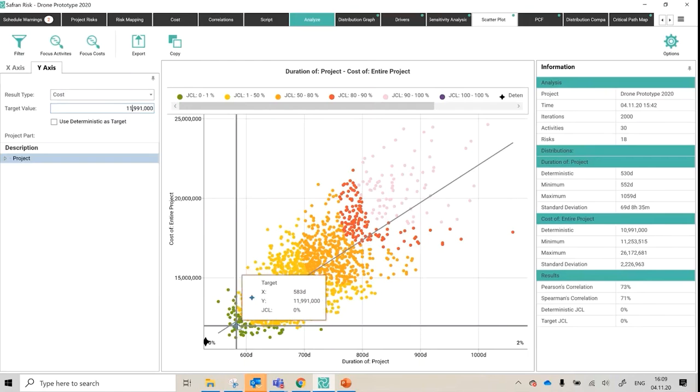It's like hardly any chance that will succeed whatsoever, because many more of the scatter plots all ended up outside of those thresholds. Say we're interested in P80. If I wanted to give a P80 value and redraw the crosshair, I would do so by looking at the color first of all and saying, well, okay, the P80 appears to be orange through to red. So it's this liminal zone where orange and red sort of buffer up against one another.